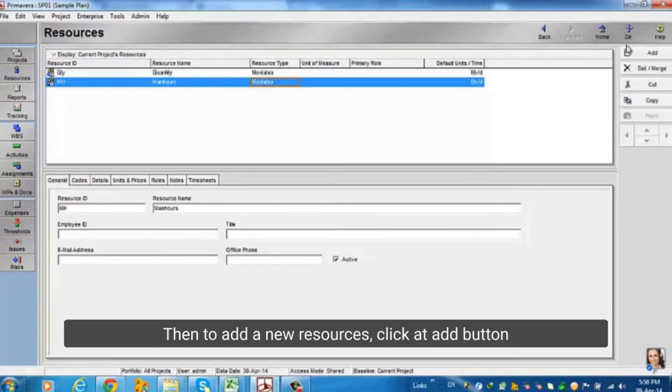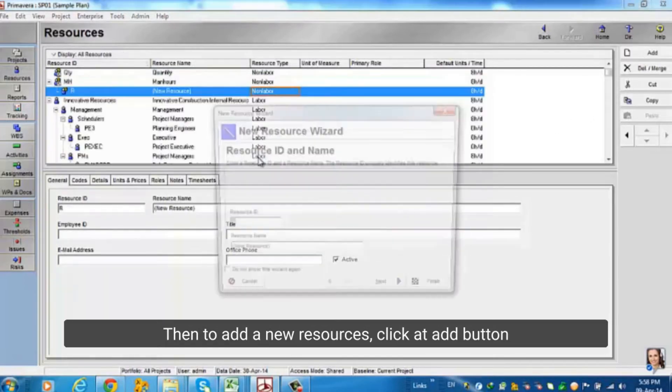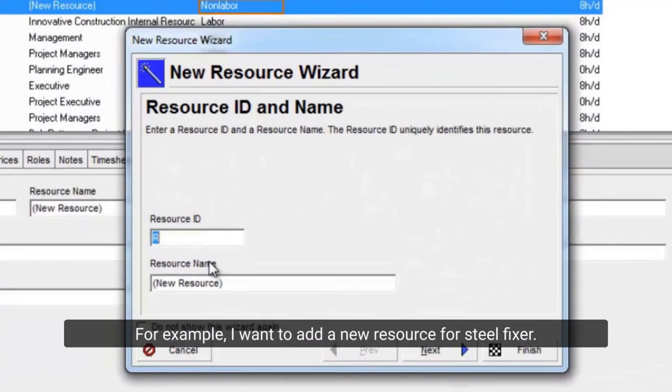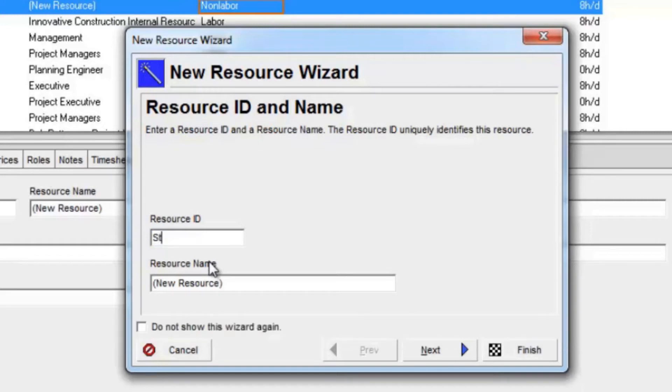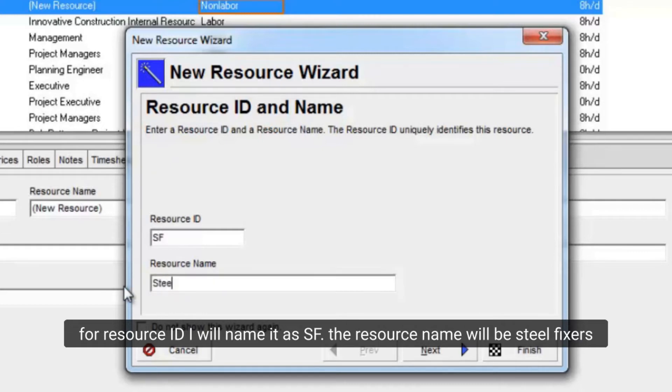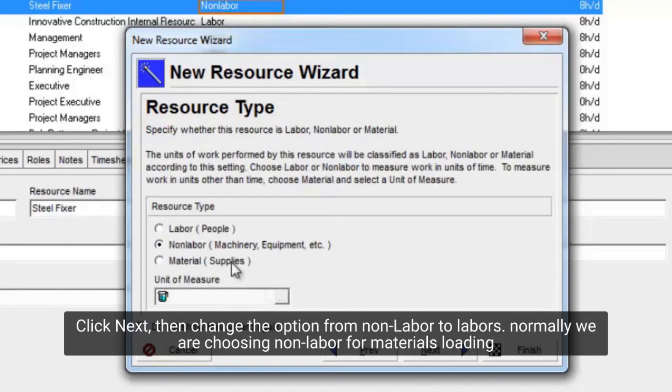Then to add a new resource, click the Edit button. For example, I want to add a new resource for SteelFixer. For Resource ID I will name it as SF. The resource name will be SteelFixers. Click Next, then change the option from Non-Labor to Labor. Normally we are choosing Non-Labor for Materials Loading.